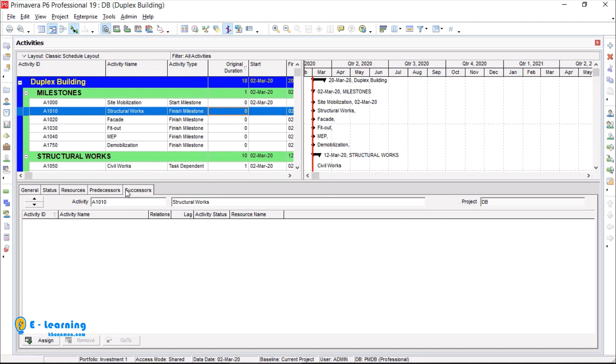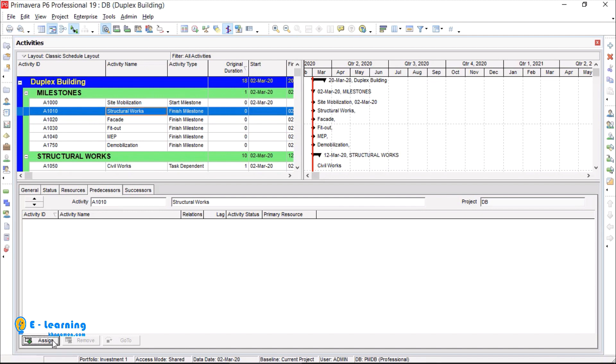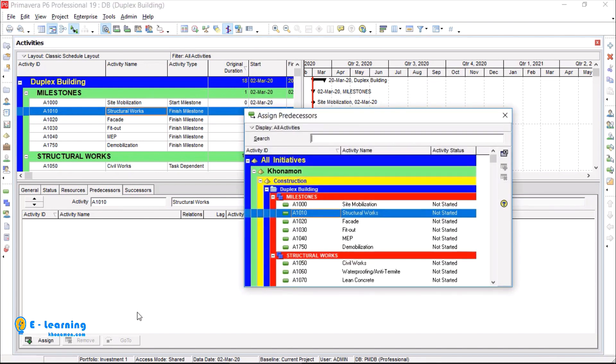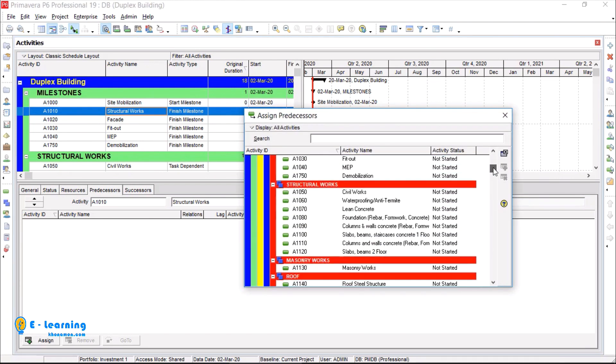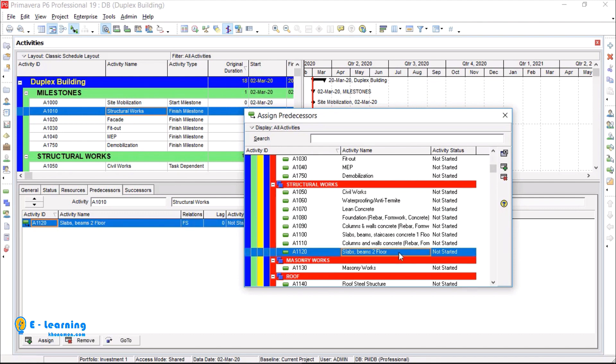Take a note that successor is reverse form of predecessor. I've created a draft in Excel for predecessor activities. I've selected the activity, then I click on predecessor tab and click on assign. According to the Excel file as a draft, it is linked with FF to slabs beams second floor. Double click on it, it is assigned.